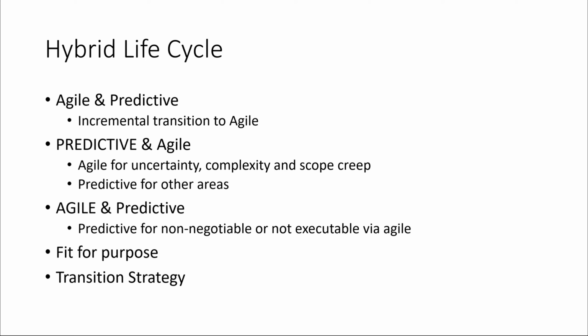The two teams collaborated on the input variables and how to consume and display the output value, but beyond that, the calculation team worked in a largely predictive manner. When the calculation team's portion was complete, the output from the premium rate calculation was displayed on the screen and in the reports. Then the business users provided feedback on the appearance and the use of the information. The two teams ran concurrently, but had little need for interaction. Having them physically close to each other made it easier to check on the development progress, but largely they were separate sub-projects.